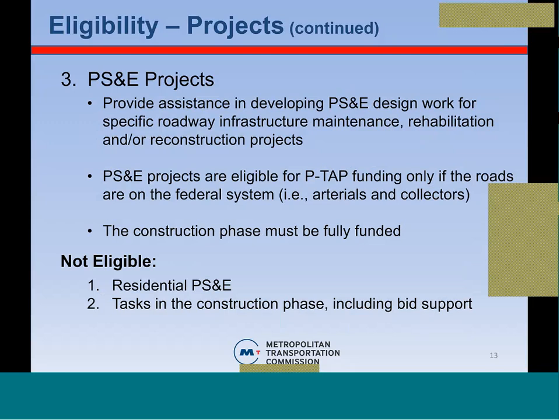What you would do is you would go to one of the consultants, and I have a list of the consultants and their contact information, and you would get some estimates on what it would take to design the segment that you're interested in designing. Please don't apply for this unless your construction phase is fully funded. You're going to need to provide verification of that if your project is selected. Not eligible: residential design and tasks that are in the construction phase.